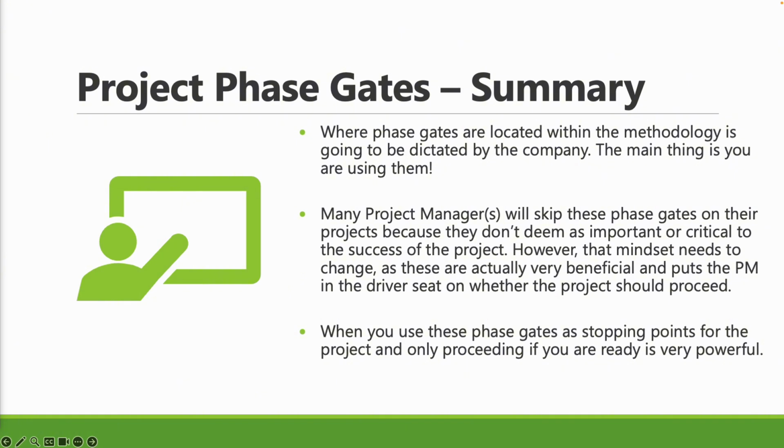When project managers use phase gates as stopping points, it becomes a very powerful tool in how they're executing and driving the project. If they're not feeling good about the project, take it to the phase gate. If they're seeing the deliverables are not complete, take it to the phase gate. You can fail a phase gate. Pause the project, get the work done, and then come back to that phase gate.